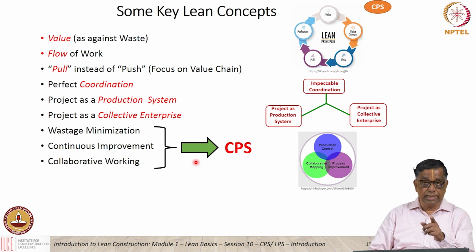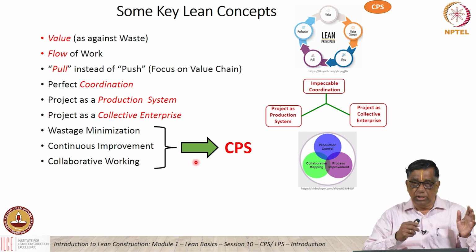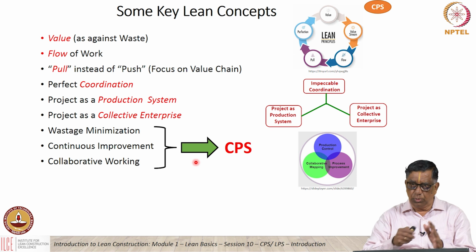And what does that entail? That's actually work in progress. That involves working capital, which is not productive. Till the rebars get embedded in the concrete, get properly built and get paid by the client, it is not creating value. So, we have unnecessary work production which is not contributing to the client. So, we tend to push the work, not pull.